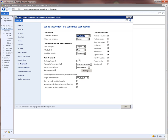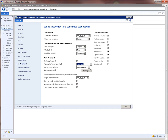These parameters act as defaults on newly created projects. So if I enable budgetary control here, then any new project that is created henceforth will automatically be enabled for budgetary control. I can choose to just do budgets on costs, or I can do revenue budgets, or I can choose to control both cost and revenue budgets. For this demo, let's just do cost budgets.